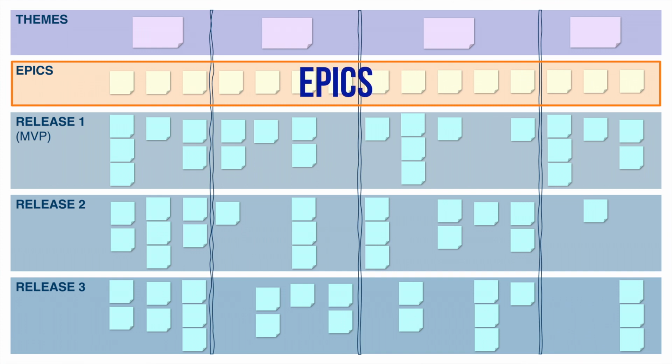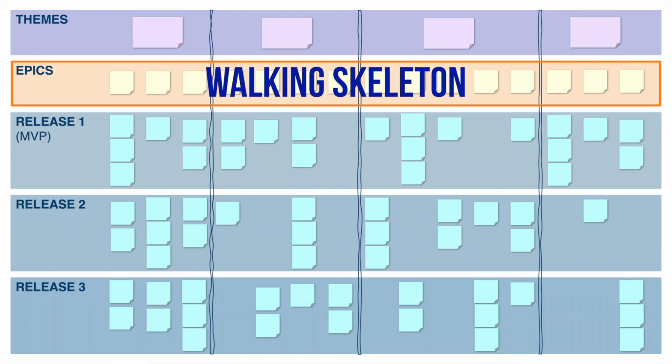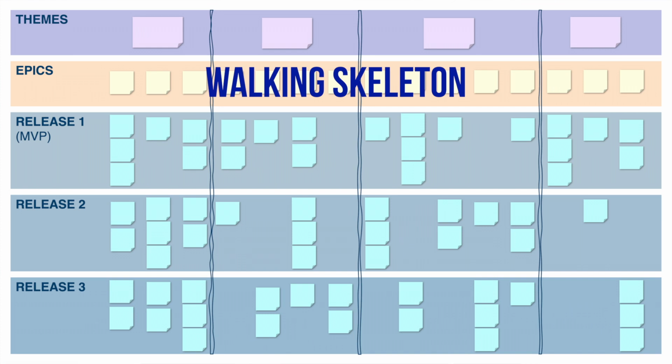The sequence of epics is sometimes called the walking skeleton, and it represents a summary of the entire product, the flow of the process through it. Now, an epic is too much work to achieve in a single iteration or sprint or even release. So, epics are broken down into smaller user stories represented below their epic. These put the flesh onto the walking skeleton.